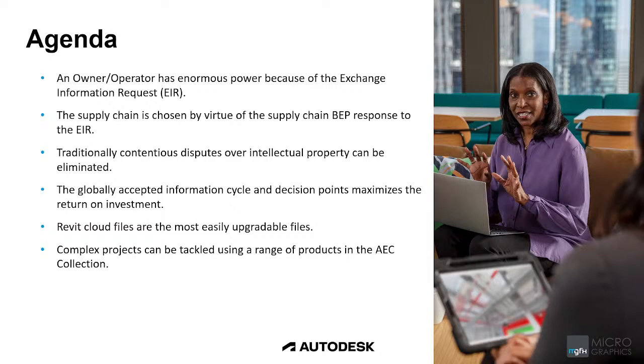However, if you are the owner, you can say, I insist that you give me the original authored BIM file. In other words, I will not accept that you only give me a static file like an IFC file. You have to give me the originally authored file. How that file is shared is a question. So will you allow other companies to have access to the originally authored file as a copy within a BIM Level 2 compliant environment like the Autodesk Construction Cloud?